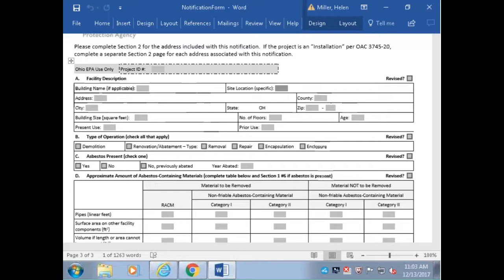But if you notify with 20 addresses on a project, and then 2 months later that notification is still open and you get another 10 houses allocated to you, you cannot add them to the one that's currently open that you originally notified with 20. That will be a whole separate notification for that set of projects. So that's how that will work.